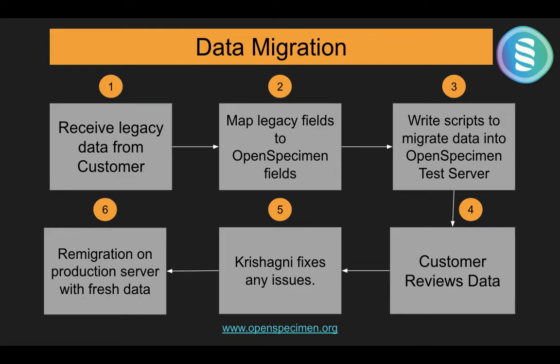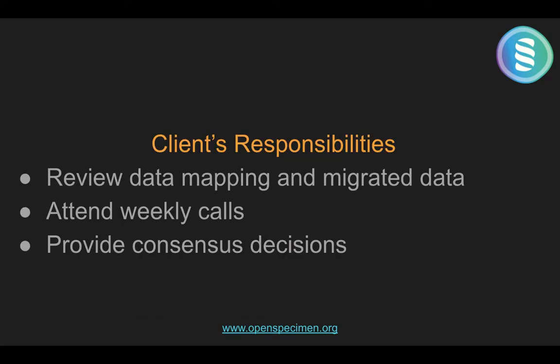Once this is done, we will move towards the go live. We will re-migrate all the data on your production server with a fresh export. So this is the overall data migration process.